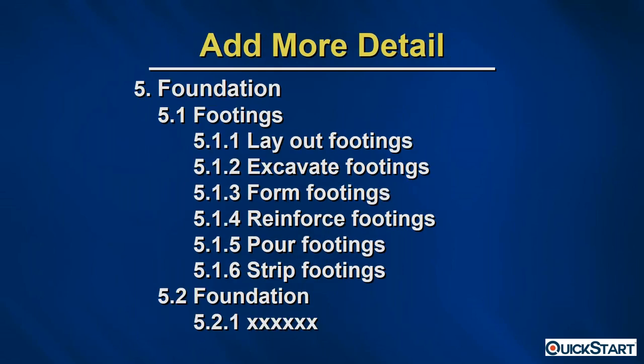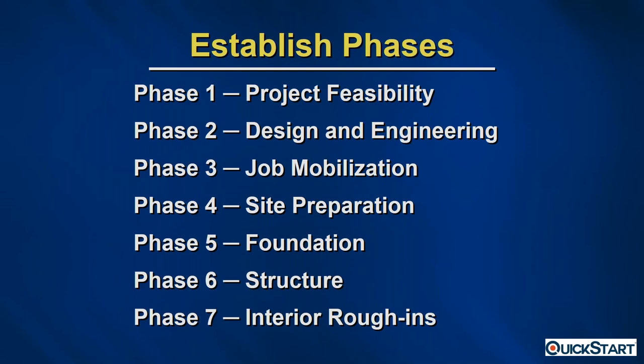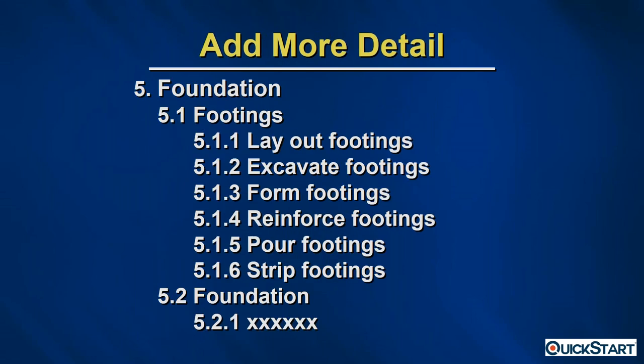You want to add more detail. Phase five is 'foundation.' If we take foundation and decompose it further, we break it into footings, and then decompose footings down to the activity level: lay out the footings, excavate the footings, form the footings, reinforce the footings, and so forth. We're leveraging the WBS to decompose the project down until we determine what tasks are required.